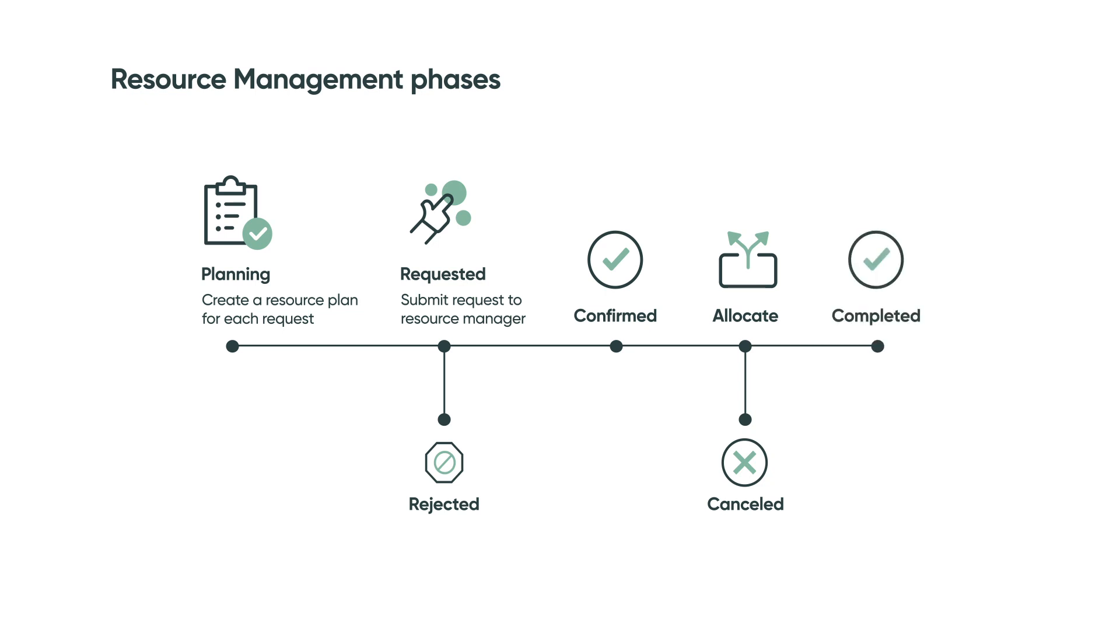The group completed their work. Once I move the resource plan to complete, all future allocation hours after the completion date become zero. Now I can put the resources on a new project requested from another department.